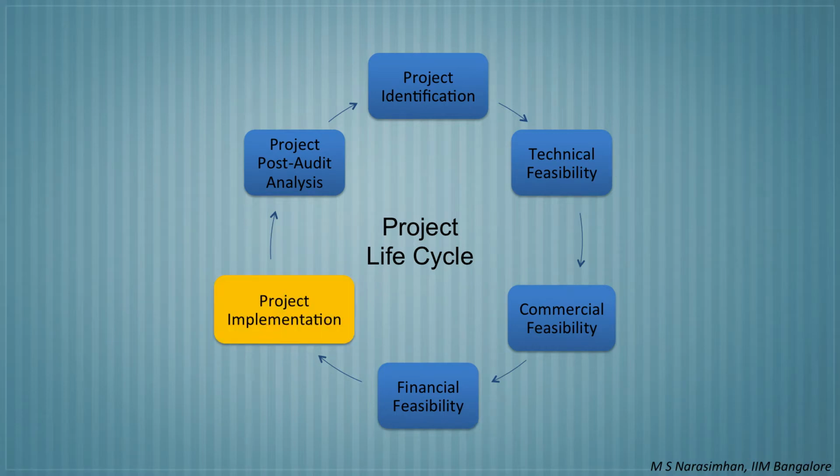The progress of the project is continuously monitored to ensure that there is no cost or time overrun. Most projects fail mainly due to substantial escalation in the project cost, which is partially on account of time delay or underestimation of the project cost. In the entire project life cycle, project execution is the most critical stage.